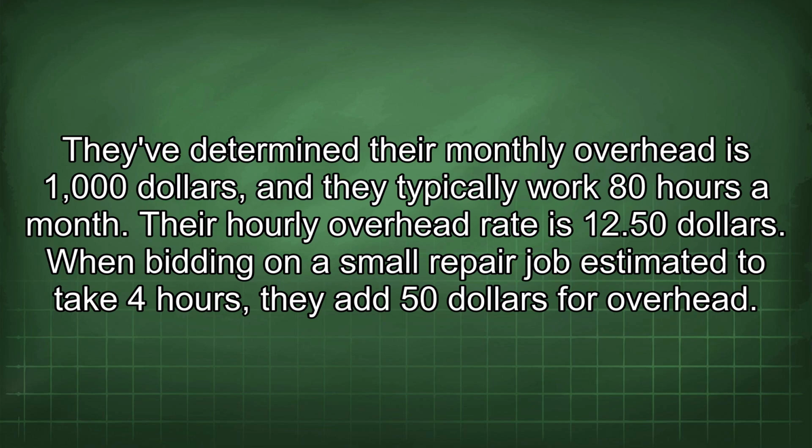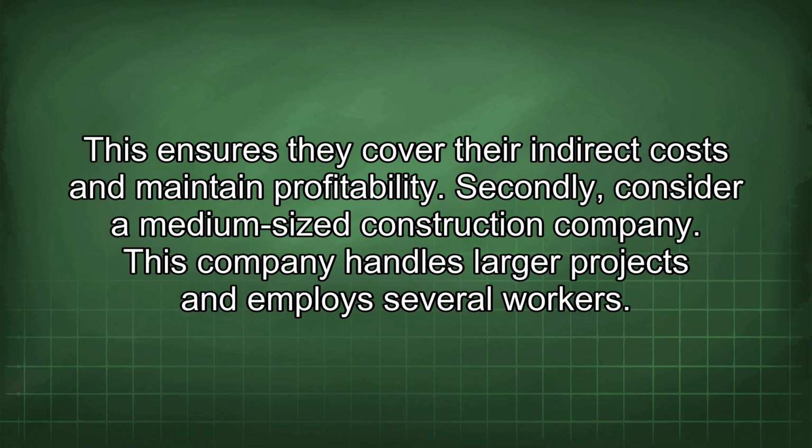Their hourly overhead rate is $12.50. When bidding on a small repair job estimated to take 4 hours, they add $50 for overhead. This ensures they cover their indirect costs and maintain profitability.